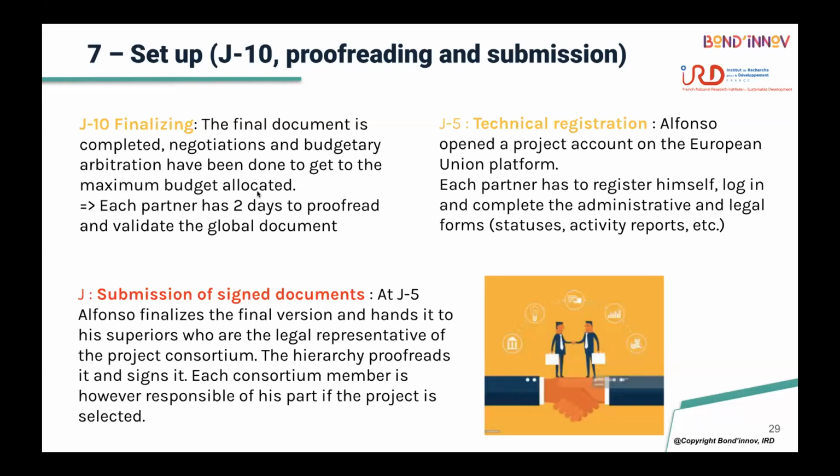I can give an example with the call ARISE, African Research Initiative for Scientific Excellence, launched by the African Academy of Science. At the beginning, in the template provided, there was a budget template, and they asked candidates to prepare the budget in euro. But when the candidates started uploading their data on the submission platform, they found that there were indications saying the budget was in dollars.